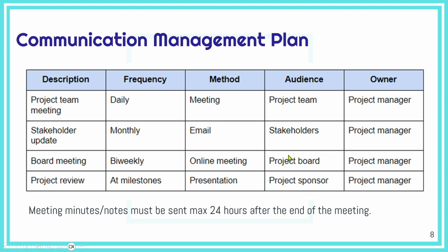Who should attend, who's the owner, and we talked about the importance of also stating the backup in case the project manager, for example, cannot conduct such communication because they're on vacation or they're absent, then somebody should replace them in that communication. And we talked about that, and we had several questions about that.